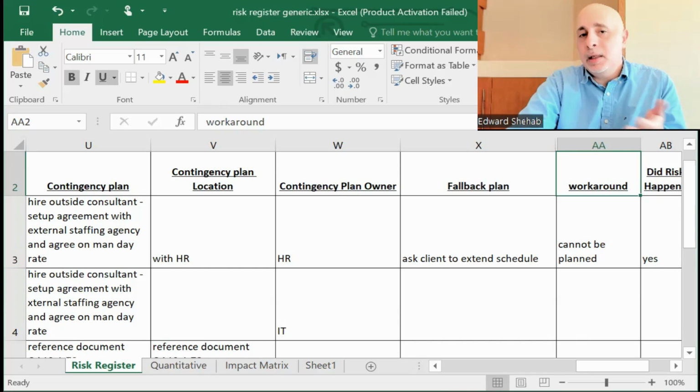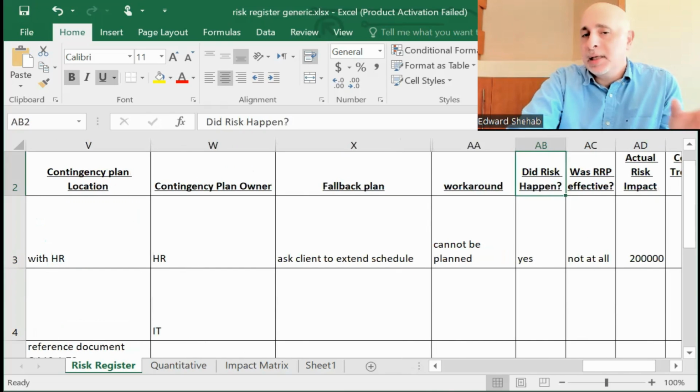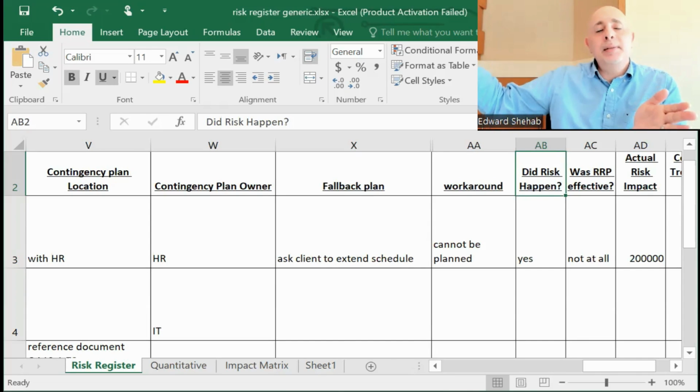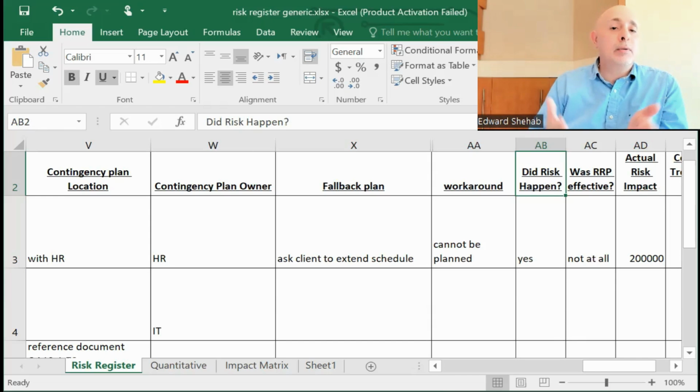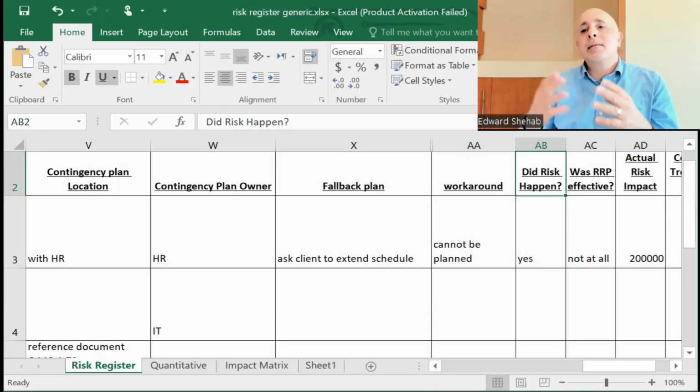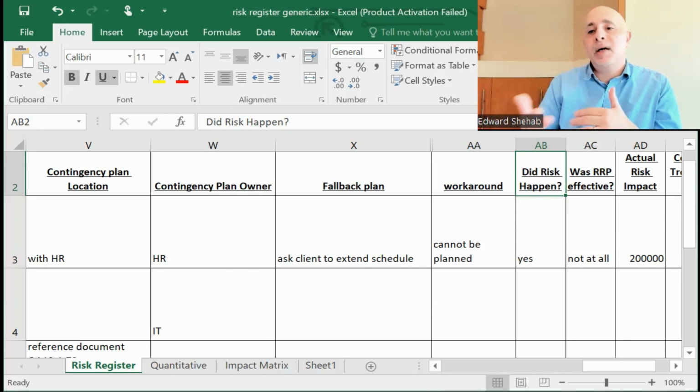All right, so this is how we mitigate our risks. All mitigation plans need to be approved by your sponsor or management because they come at a cost. They change your project plans, they change due dates; sometimes we add time, we add budgets and so on. Now, as the project starts to happen, you need to continue to revisit the risk register. You can do that every week, quickly with the team, and say, do we know of any risk? Or maybe create some sort of a channel where the team can notify you whenever they identify a risk, maybe using a specific email so that you can update the risk register and reanalyze.